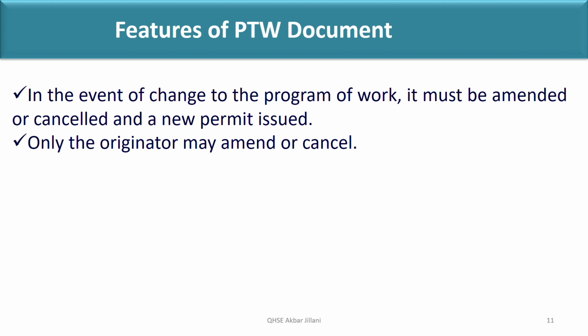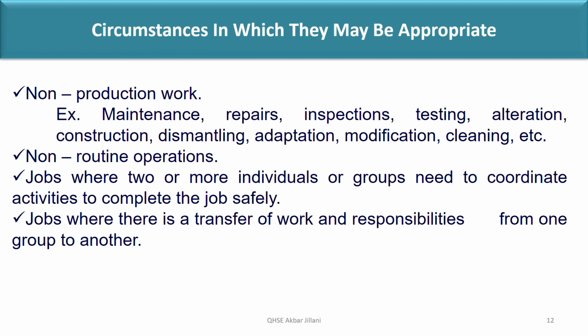In the event of change to the program of work, it must be amended or cancelled and a new permit issued. Means when the scope is changed, a new permit will be needed for this. Only the originator may amend or cancel. Circumstances in which they may be appropriate.